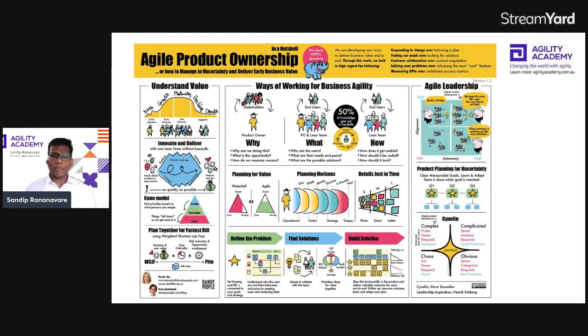So you need in-depth knowledge of how to decompose different work items or different initiatives into small chunks, and after doing that, how to shape them up with the right kind of details. It should have enough details to inform the people on the ground who are going to work on it, with regard to why we are doing it, what we are supposed to do, and for whom we are doing it.